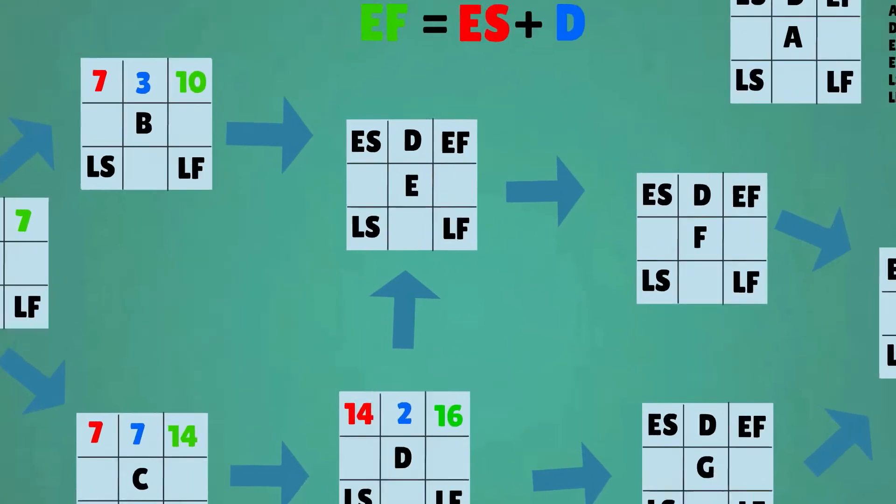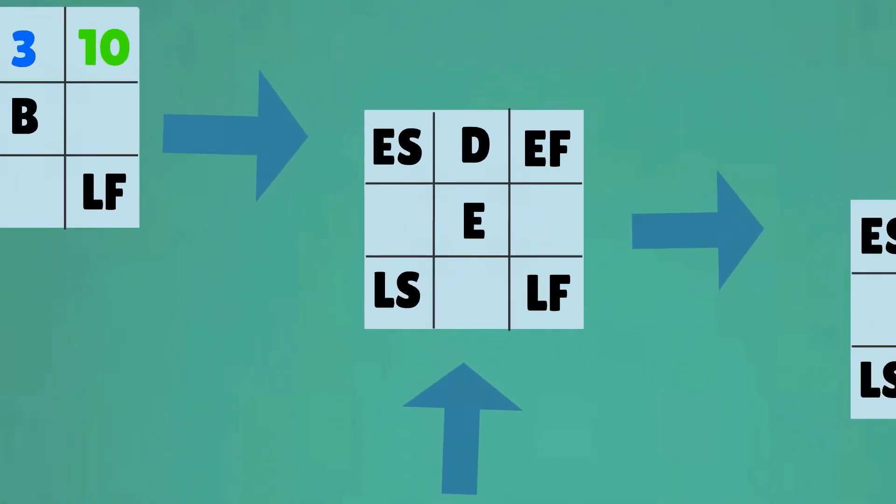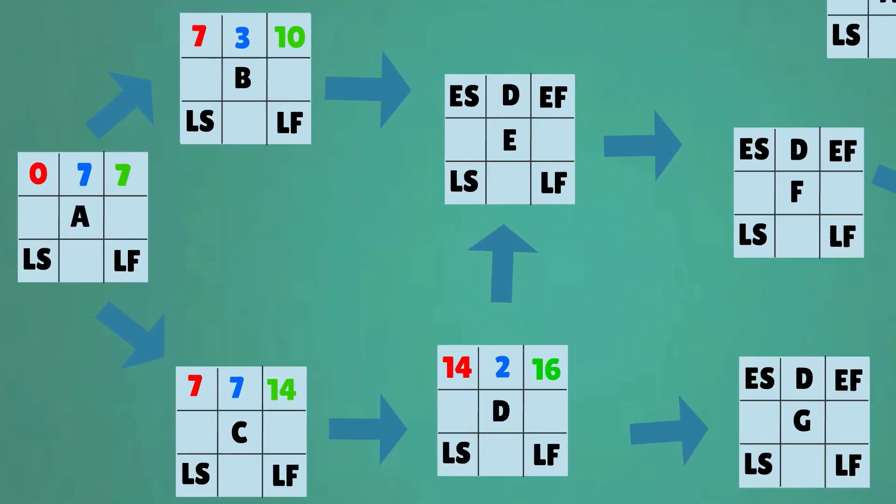When we look at activity E, this could not be done before both activity B and activity D have been finished. As activity E can only proceed when both activity B and activity D are finished, the early start time of activity E is the latest finish time of the two, in this case week 16.